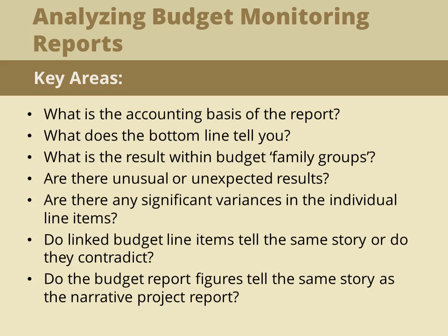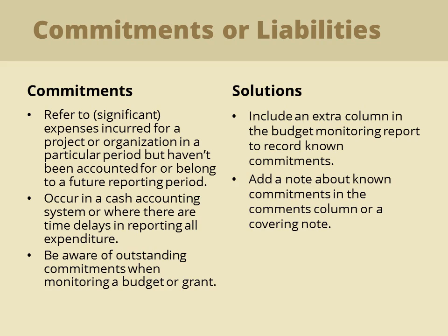Sometimes the figures just do not look right, so trust your instincts and follow up your concerns. Commitments refer to significant expenses, which have been incurred for a project or organization in a particular period, but haven't yet been accounted for or belong to a future reporting period. Commitments usually occur in a cash accounting system or where there are time delays in reporting all expenditure, for example from field offices.